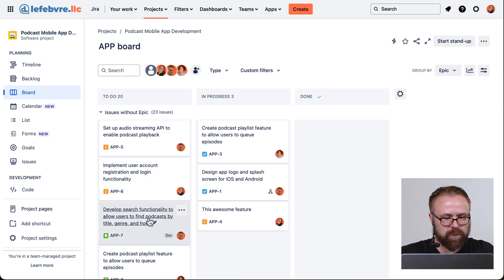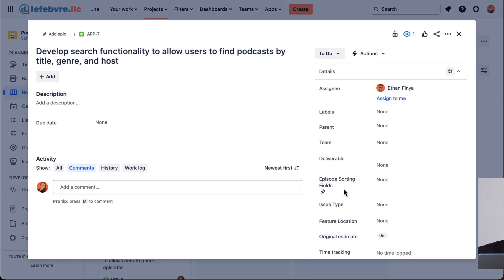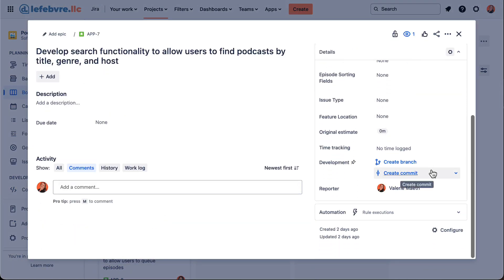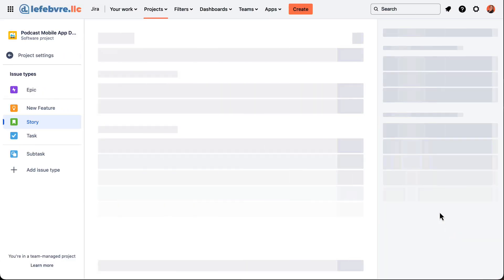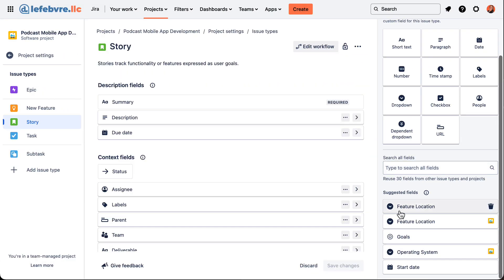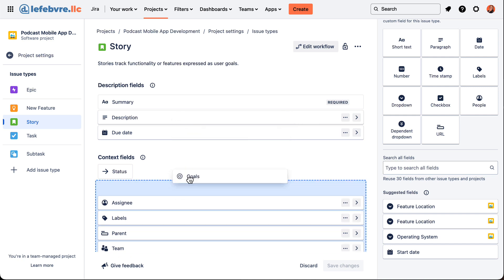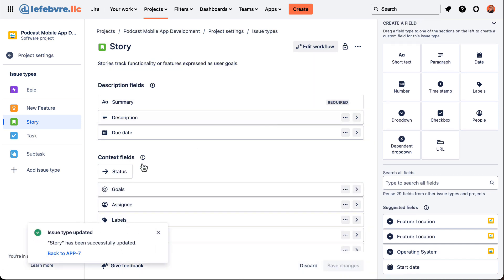If we go into one of these issues, we need to add that field. We haven't added the goals field yet, so let's add the goals field to the story issue type.